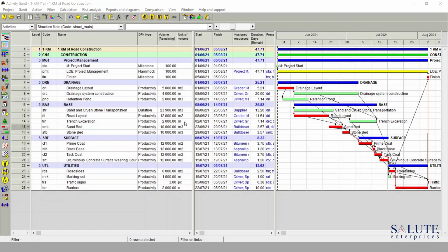Spider Project allows full integration of time and cost, taking into account all possible cost elements. Each project is unique and may require different cost elements. We need to be able to manage cost of our materials, labor, machinery, licensing, contract. We might need to be able to manage indirect cost, penalties, and cost of delay, and some others. All of these could be set up as cost components in Spider Project. Let's set up cost components for our project plan.